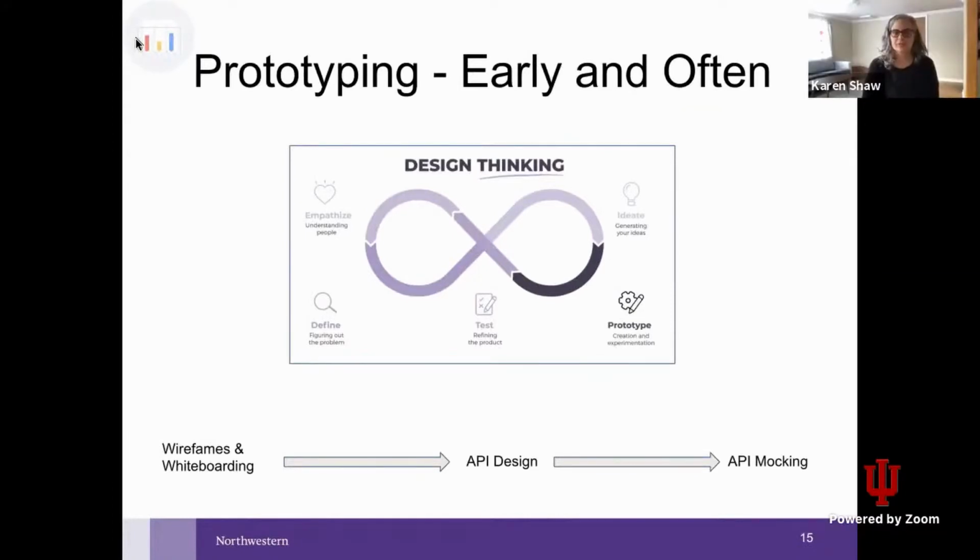So before going too far in one direction, we want to get a working but minimal coded prototype quickly and get it in front of users for feedback. With design thinking like Agile, prototyping is a continual process of generating feedback and iterating, not a one-time thing. Our route to get from wireframes to a working prototype was to start with the API. First, we planned out our GraphQL API, and then we proceeded to mocking it. Defining the shape of the data up front keeps both teams on the same page.